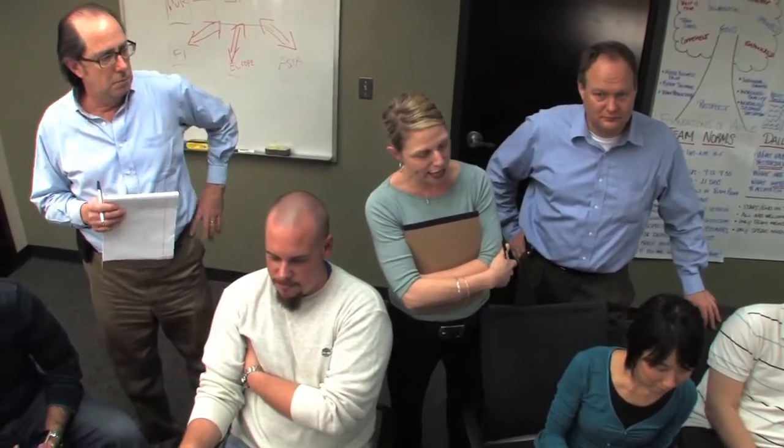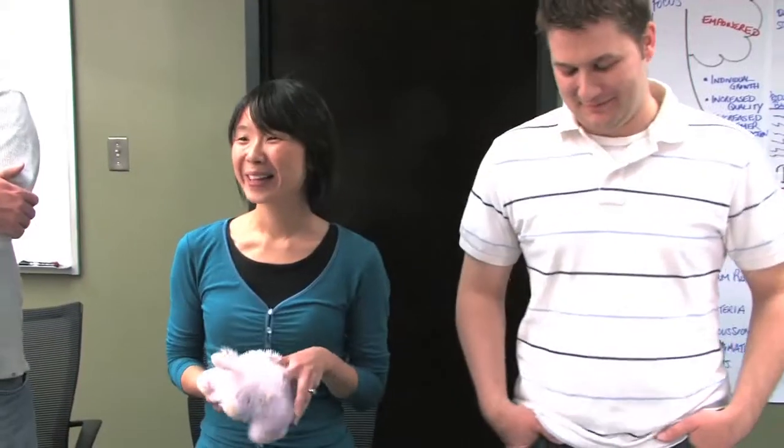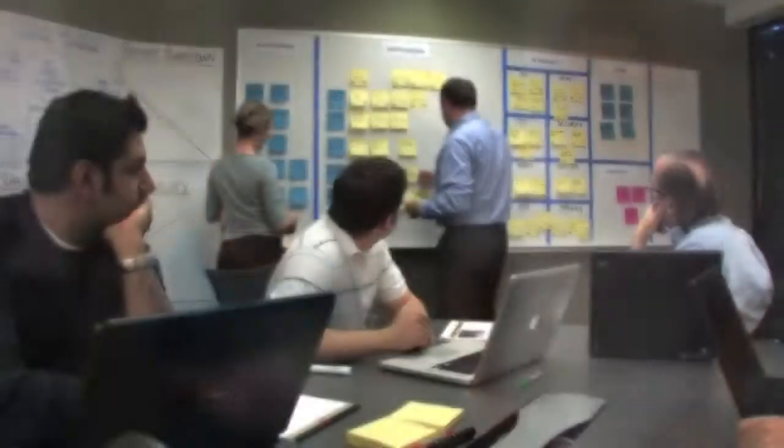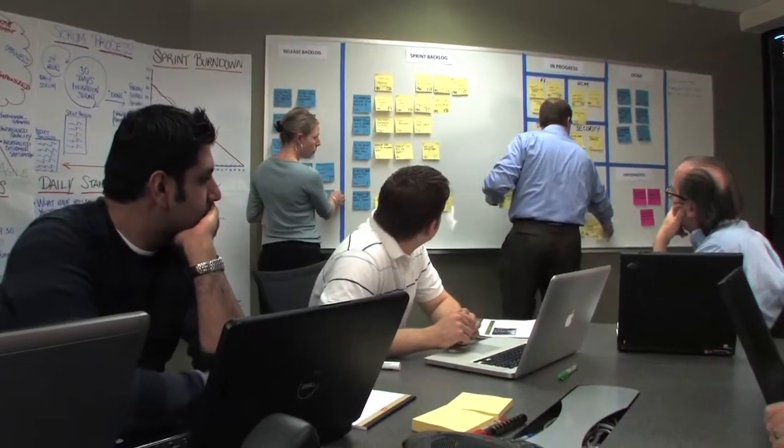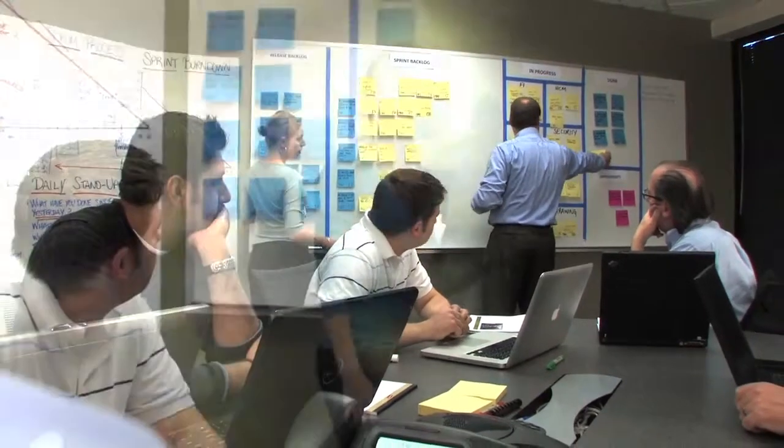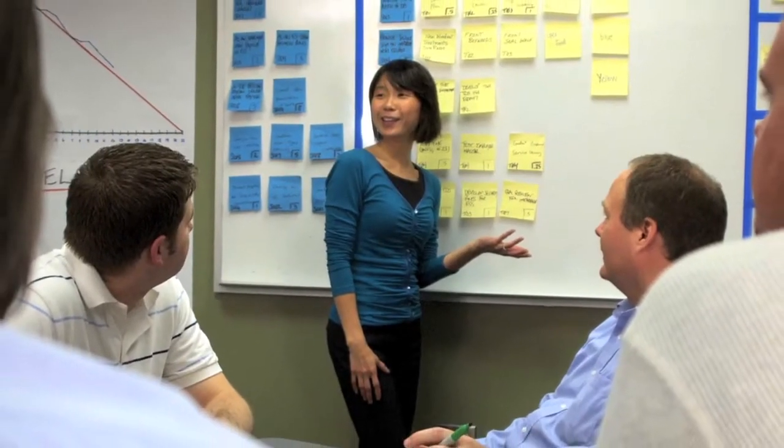Another thing the Scrum Master does is conduct a daily Scrum meeting. What's that mean? It means the entire team gets together, and they tell us everything that they accomplished yesterday, everything they're going to accomplish today, and any impediments or issues that they're experiencing so that the team can focus on those and remove them so that the team can maintain its productivity and maintain its efficiencies.